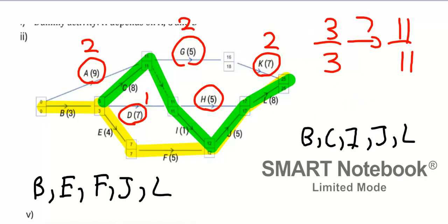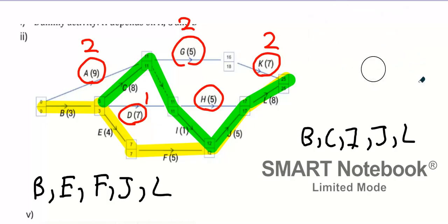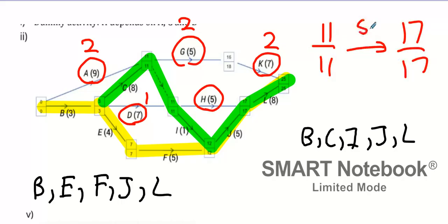And finally, H, guys, H. What are we thinking of here? Seventeen take 11. 6 take 5, 1. Okay. We killed that. Okay. We're doing the next one, guys.